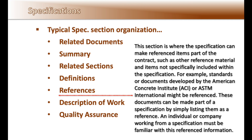The references section is where the specification can make referenced items part of the contract, such as other reference material and items not specifically included within the specification. For example, standards or documents developed by the American Concrete Institute (ACI) or ASTM International might be referenced. These documents can be made part of the specification by simply listing them as a reference, and an individual or company working from the specifications must be familiar with this reference information.